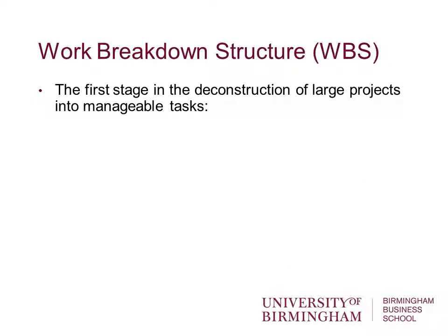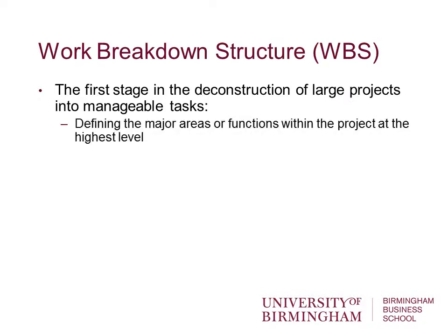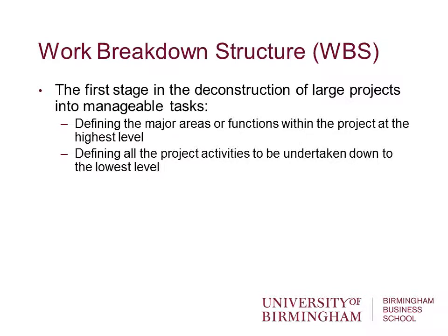So what's the work breakdown structure? The first stage is to deconstruct large projects into manageable tasks. So work breakdown structures are used in virtually all projects of even a small scale. We start with defining the major functions or areas of the project at the highest level, and then we get more and more details that go down into the structure. It's not, and I underline that point there, it's not a schedule or process for the project.